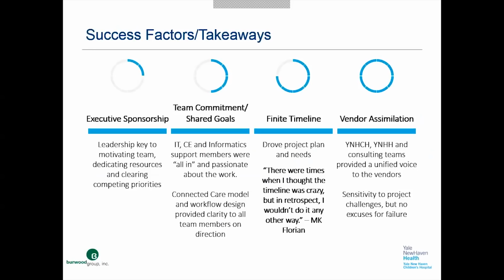We talk about team commitment and shared goals. From my perspective, the Yale team was exceptional in terms of their effort and commitment. We really didn't see much wavering at all across what was a large group of stakeholders here. And the model itself, once we established the connected care model and we had that project planned, Sam mentioned building the project timeline backward. It really provided clarity, and that's a mistake we've seen made before, where projects are treated as steps, not knowing what's next. And I think that the Yale team did a wonderful job of keeping focused on that model and sticking to it.